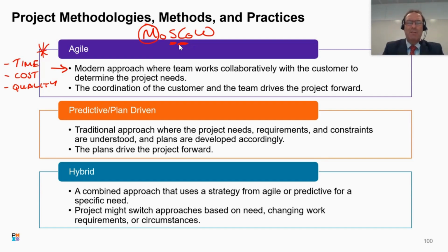A question I often get asked when using these type of methodologies, well, how do I determine what a must-have is? And the question is very, very simple. Just go to the requirement that the customer has stipulated. And project managers, all you need to do is say to that customer, in the absence of this feature, this requirement, would the output still work? And if the answer is, well, yeah, we could still use it, then it's not a must-have requirement. A must-have requirement means that in its absence, the output will fail. So it's just worth bearing that one in mind.